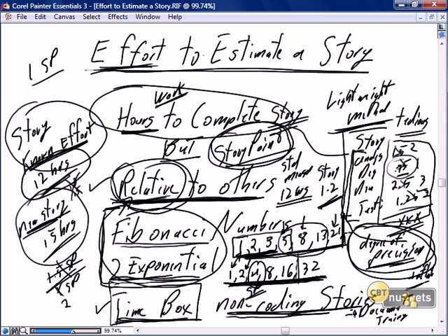Otherwise, as we know, a lot of these activities, documentation, training, exploration, can literally be exponential in their own right and go on and on forever. So a very common approach is simply to time box, pick an arbitrary number, 3 story points, 4 story points, depending on which sequence we're using, and say all non-coding stories are going to be of that time box, and stop work when the story point consumption is done. If you still need more documentation, you create a new story.